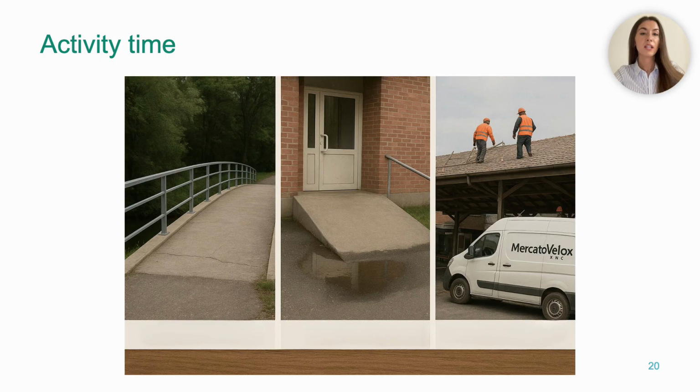And lastly, the village market roof is a classic corruption scheme 3 pattern. The company doing the work on site, Mercado Velox SNC, does not match the contractor listed on the board and in the paperwork. This could point to hidden subcontracting, front companies, or even political connections behind market renovation.